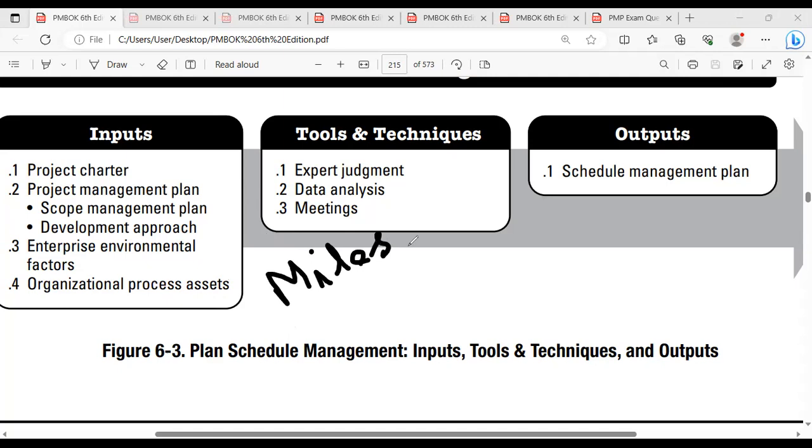Milestone. Yeah, milestone schedule format. And to develop this milestone format, you don't require a full-blown sophisticated software, a high level one. Primavera is not needed. You don't require MS Project, or a Jira application, or Rally applications, or any kind of Basecamp-like software. You need only Microsoft Office, a PowerPoint presentation will do to bring this milestone format.